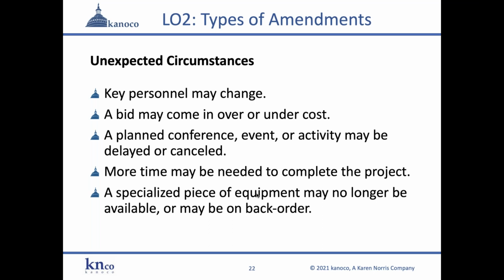Think about all the changes that had to occur during COVID and shutdown. So more time may be needed to complete the project. That's very typical. That's your change to your period of performance, the extended end date.